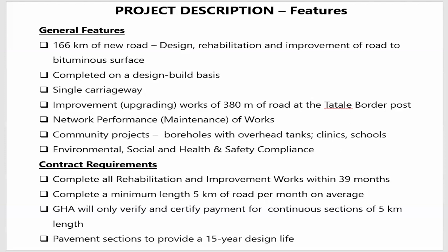The health, social, and safety compliance, I will show it because it's very crucial; it forms part of the deductions. In the lump sum contract, if the contracting engineer doesn't meet the environmental, social, and health safety issues that are defined in the contract, every month there are deductions against his lump sum. The contracting engineer is not paid for earthworks, sub-base, base, and surfacing works.